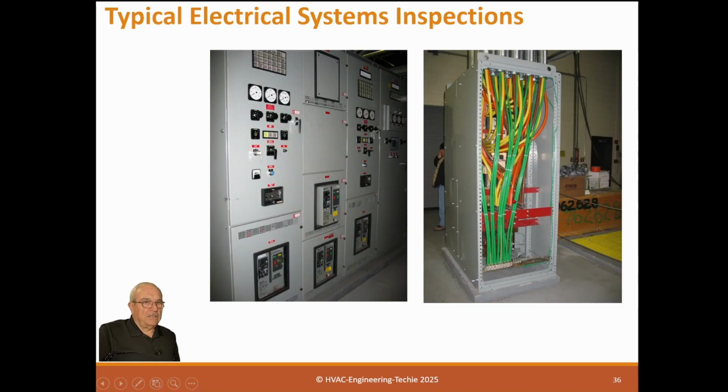Now, when you're inspecting these cables, the one thing you want to look for is if there's any damage to the cables by pull. They use machines. These are big cables, probably 2 or 3 aught. So they will actually use a machine to pull this out. And if they over pull it, it'll damage the sheath of the wire. And that can be a problem if they've damaged the wire. You might have to request they remegger the wire after they've done that. The specifications for cable have a certain pull strength. You can't over pull it. But if they over pull it, they'll damage the exterior sheath. And if they do, that's a problem.